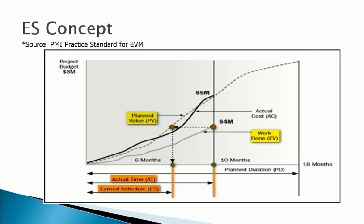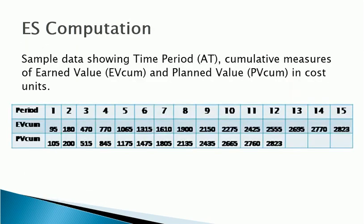As seen here, the value of ES is 6 months. It means the project is behind schedule by 4 months on the status date.